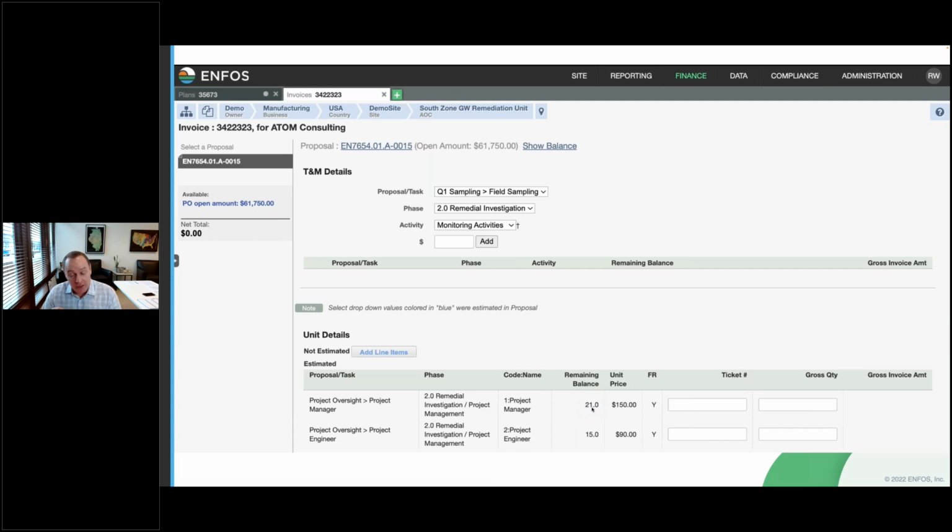That's tightening the screws down really tight. Most of our customers allow some leeway in there. But if you want your financial control to be down to the line item detail level, you can control your spend based on the approved quantity, the remaining quantity for each specific line item off the rate sheet. Again, I just wanted to show you an example.